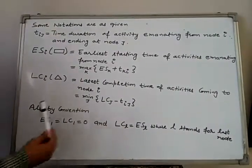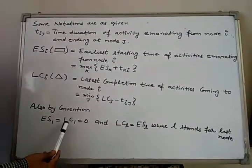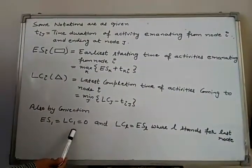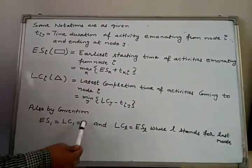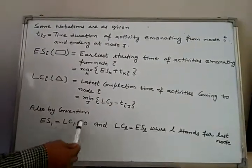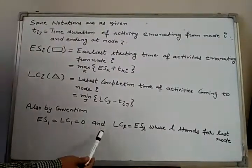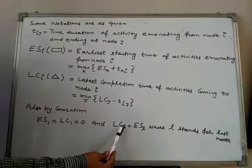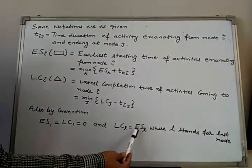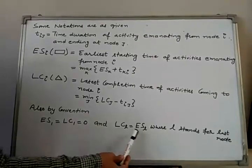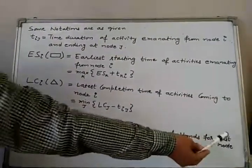By convention, we fix the earliest start time of the first node equal to the latest completion time of the first node, equal to 0. That is, earliest start time of the first node and latest completion time of the first node is 0. And the latest completion time of the last node is equal to the earliest start time of the last node, where small L stands for the last node.